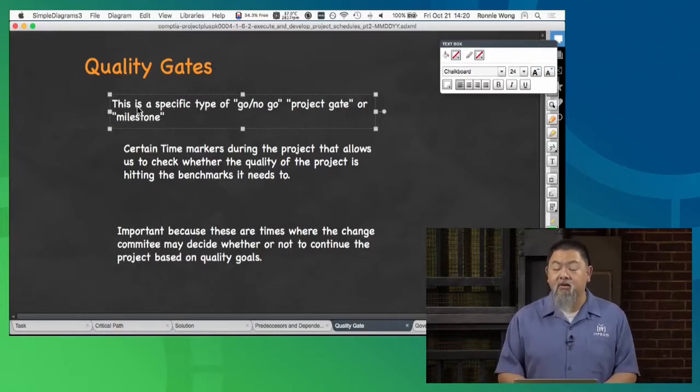Well, it could be hundreds of thousands of dollars as well. For a small company, let's say it's $50,000 to $60,000 and you worked on the whole project and now somebody says, yeah, this is not up to snuff. Well, what happens to all the money? You can't recoup that very easily. So setting up what we call, of course, a quality gate says, here's where we're going to do a quality inspection, and then we'll decide whether or not we're actually proceeding on with what we need to.